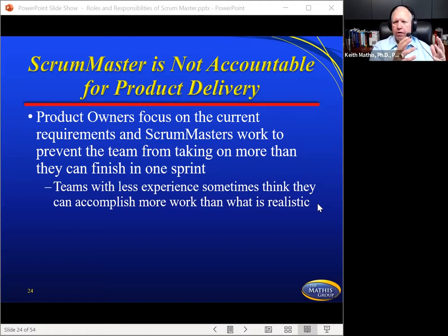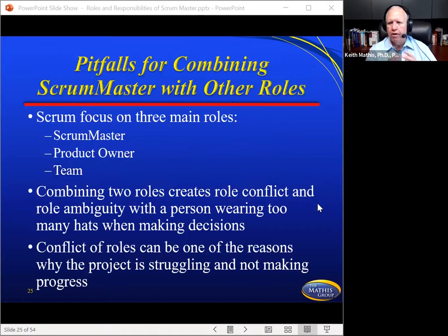They did part of it in phase one or sprint one, but they didn't hand anything off to the customer. And in sprint two, they did a second part of it and a lot of hard work, but they didn't hand anything off until sprint three for the customer to use. That kind of fights against the whole Agile mindset, because you're breaking it down smaller to where you can give something to that customer in piecemeal so they can start working with that feature. That's really the mindset and the reason why people love Scrum and Agile so much.